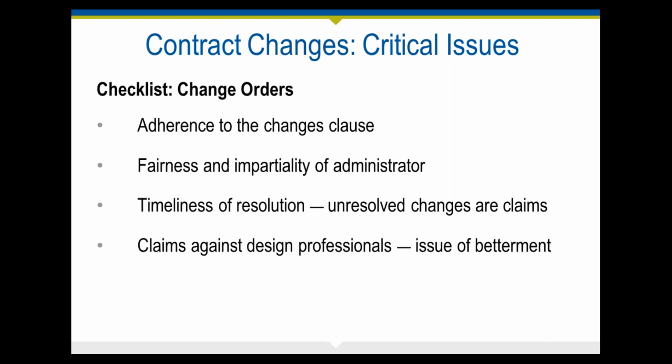So what you are responsible for is not the cost of the guardrail, but if the owner has to pay a premium to have the guardrail installed because it was not shown in the original plans, then that premium over and above normal cost could indeed be your responsibility, because there could be a claim of negligence on your part, that you should have included this, didn't meet the standard of care, and therefore this is the harm that the owner suffered.